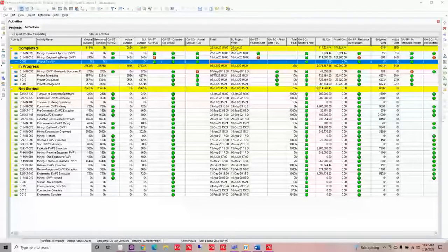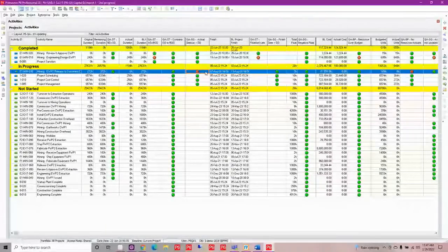So when you are finding these, you're going to want to document it. You're going to want to use maybe a notebook or maybe a user defined field to document that this is occurring, perhaps why, things like that. If they're documented, it's a lot easier when a dispute or a claim comes up that you have that right there for you to refer to and to help you with that claim.